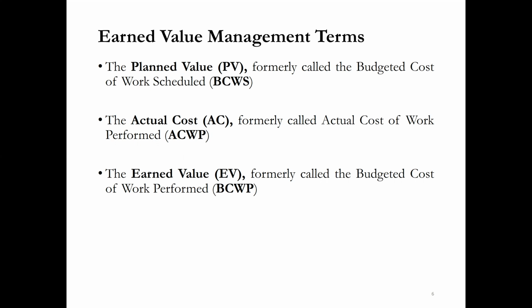How much percentage of work is complete? According to that percentage of the work on site that is complete, we will apply for payment, and the payment will be approved by the consultant and the owner. So these are the monthly progress payments we will be receiving based on the work done.